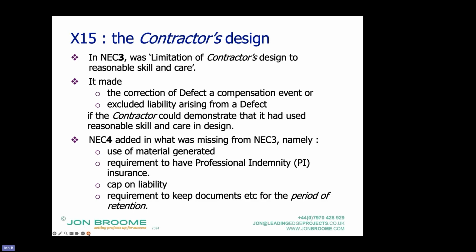So as a consultant, I have a design assignment. I use an engineer who's got experience to do it. I follow all the design codes. I tick all the boxes on my ISO 9000, including having a more experienced engineer check it, etc. I've exercised reasonable skill and care. I give that to the contractor to build it. The contractor builds it exactly as per design. Let's say a bridge. It should stand up, but it doesn't, and it needs correcting.